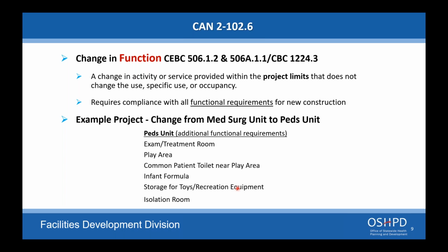We actually had a project, it was a $30 million project because they were upgrading everything to current code, and they actually heard this presentation, stopped the project. It wasn't under construction yet, but it was in plan review. They stopped the project, went back and came back in with a 0 construction project.